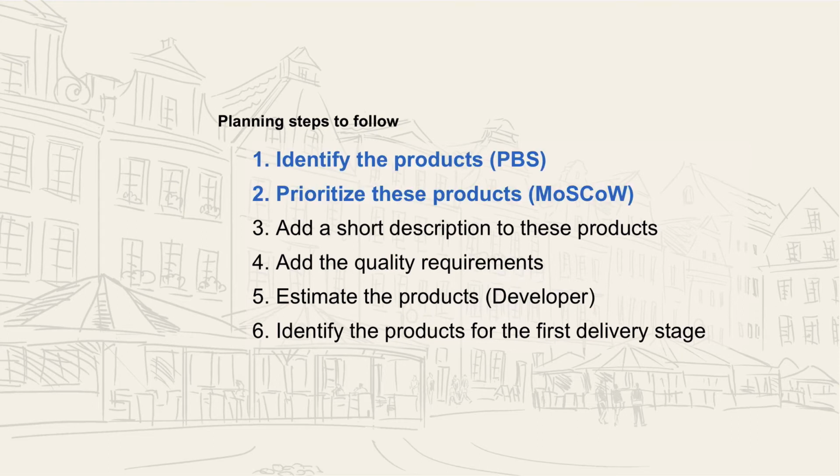So for our first workshop, it's a good idea to begin with identifying the products that need to be created and then perhaps prioritize them if we have time. Now, too many project managers try to rush these workshops, so it's important to take your time. And if we can get this done in the first workshop, then that's a very, very good delivery. And sometimes it may even take 2 or 3 workshops to create your product breakdown structure. It's a good idea as well to give out post-its to each person and ask them to identify a number of products that they think we have to create, and then review these post-its on a whiteboard.